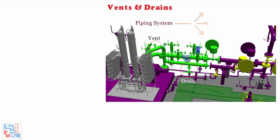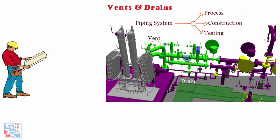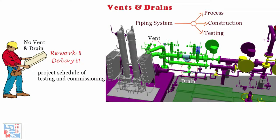It has been observed that missing out vents and drains during engineering results in rework during construction, thus affecting the project schedule of testing and commissioning. Let's see how many types of vents and drains we encounter in our design.